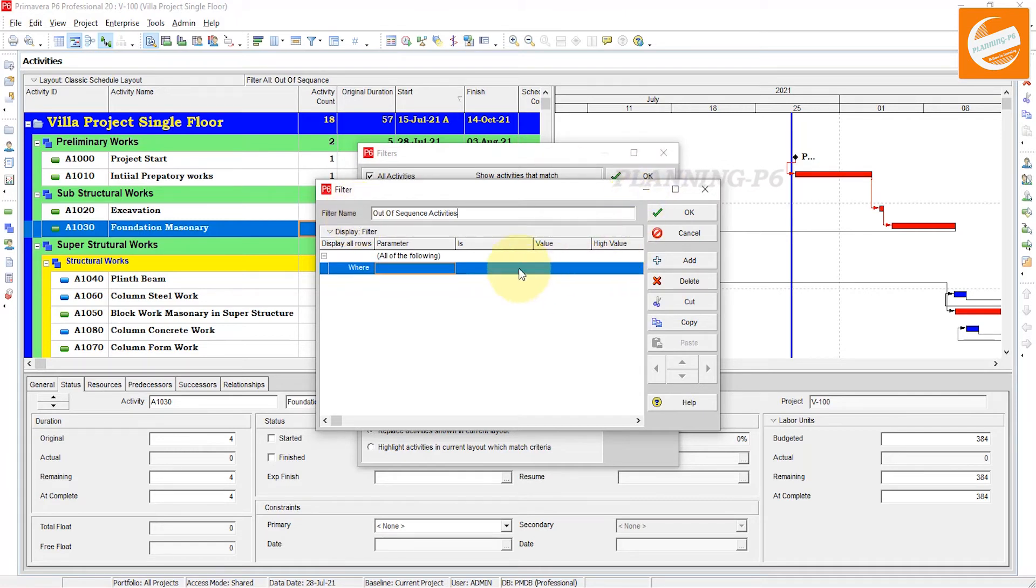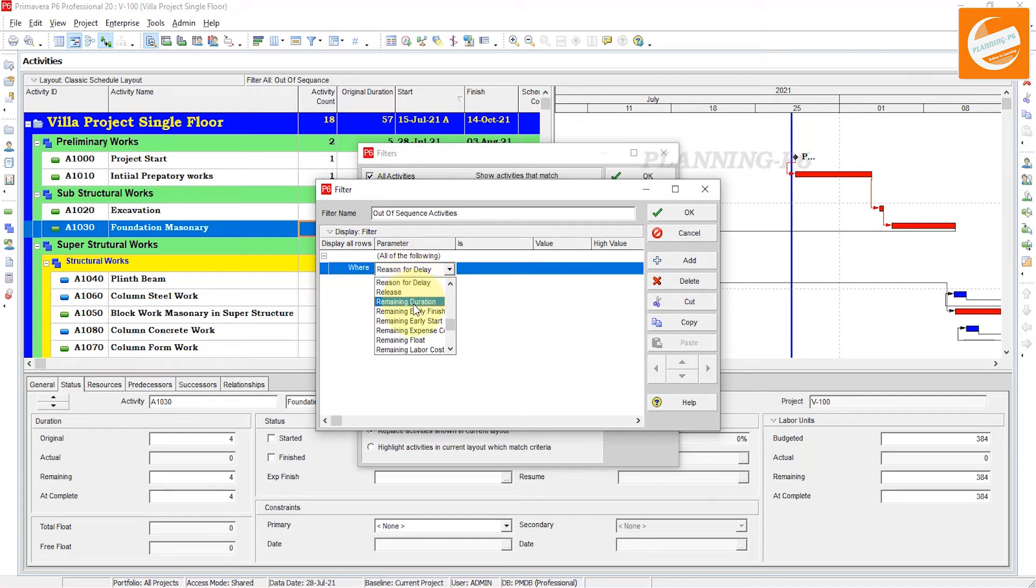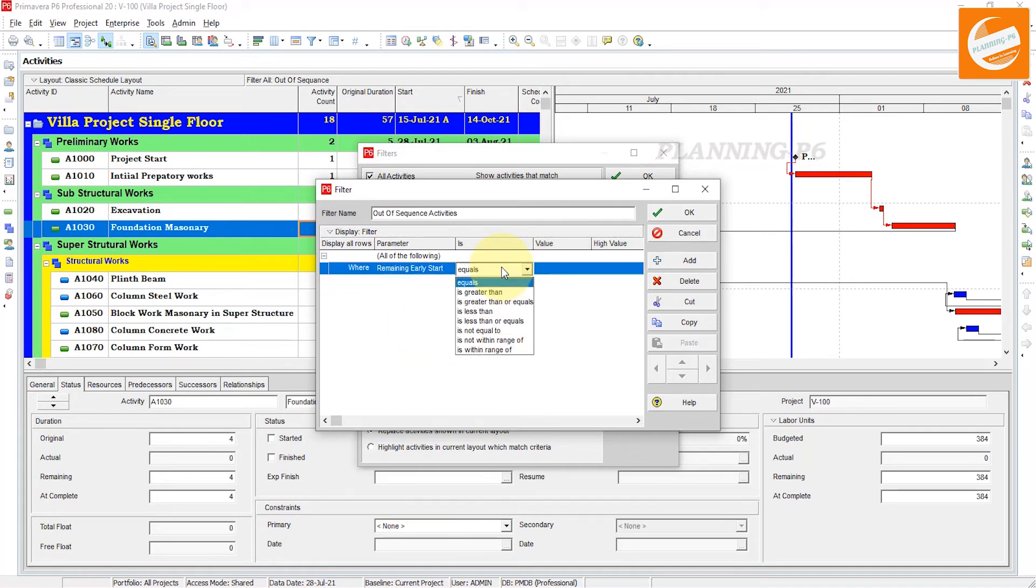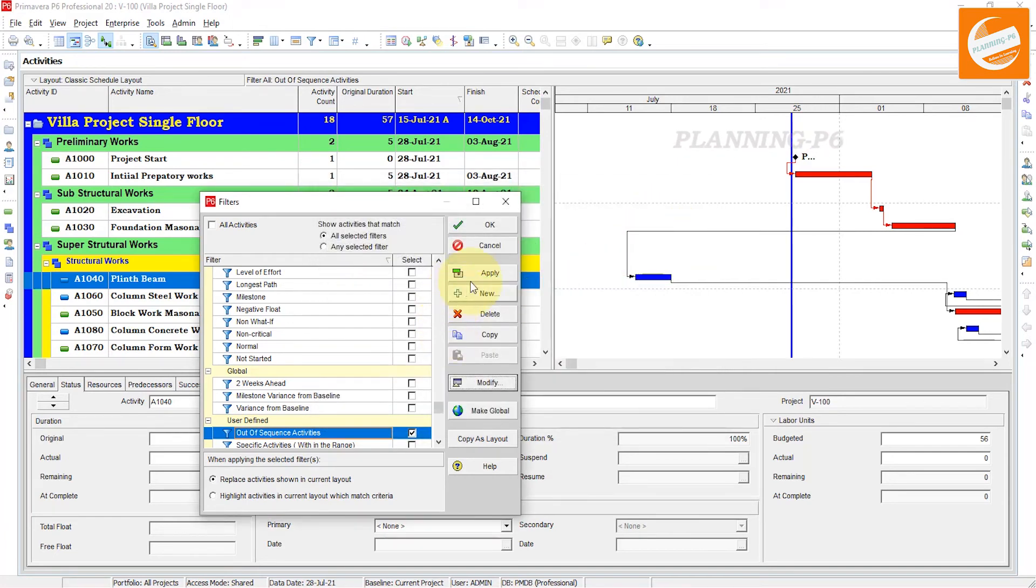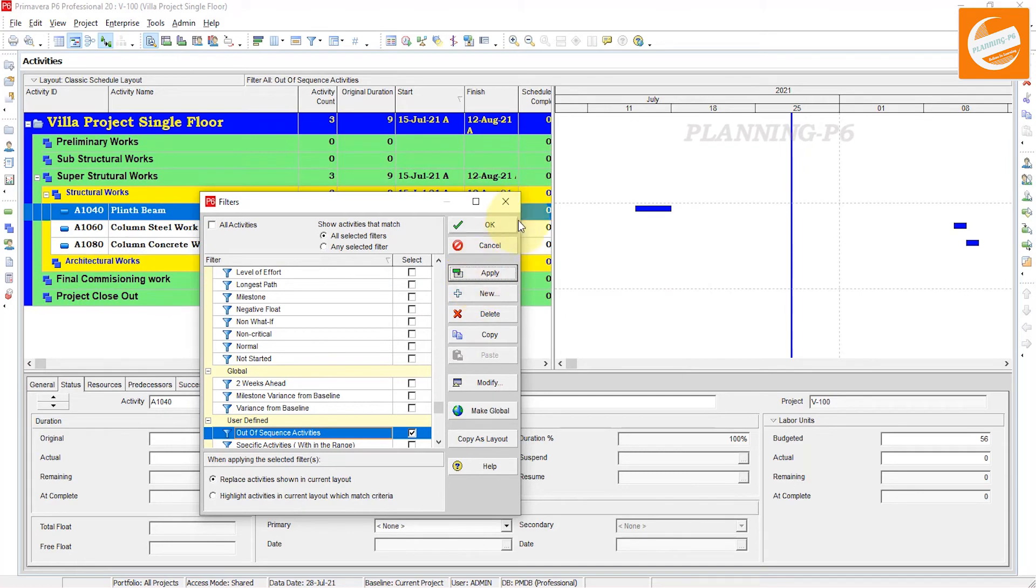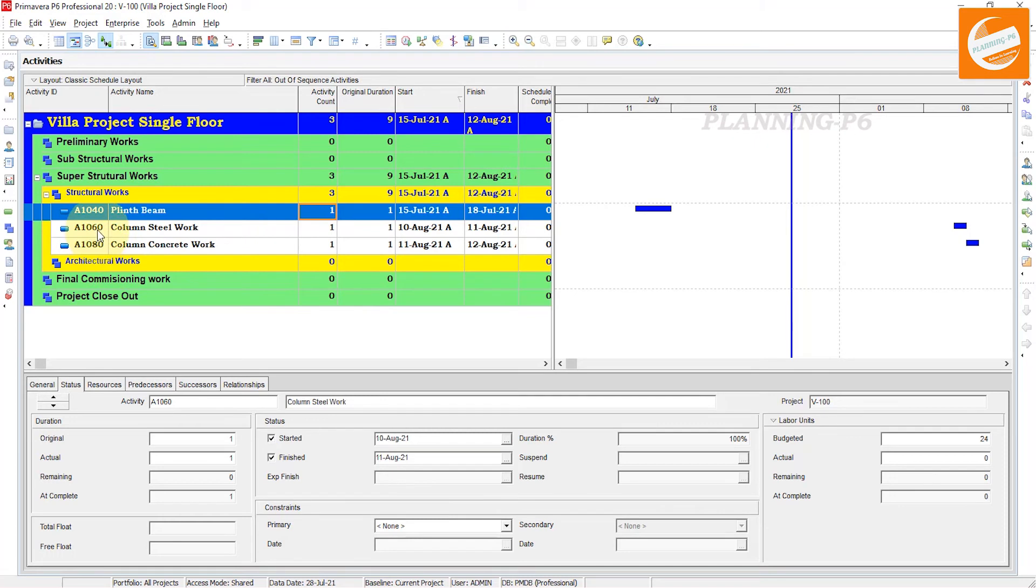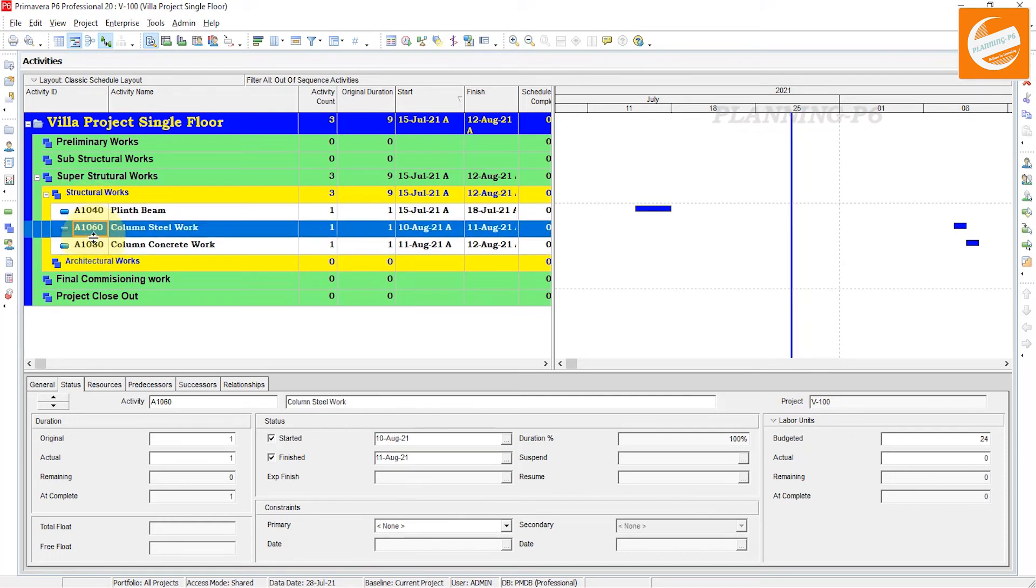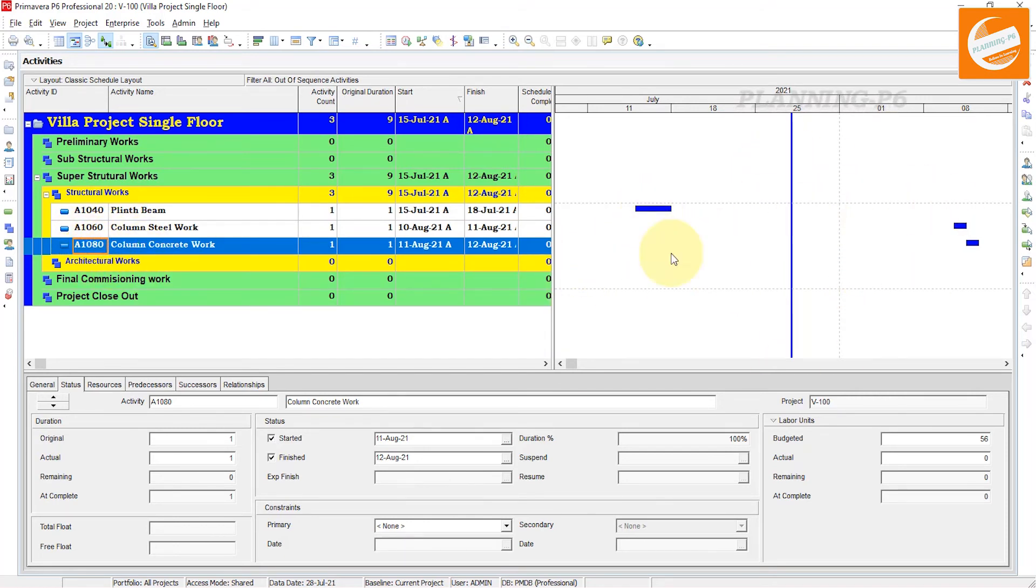Then come here and select 'all of the following' where remaining early start is not equal to not started. Apply that filter. Now in your table, only these three activities will show which are out of sequence: A1040, A1060, and A1080.